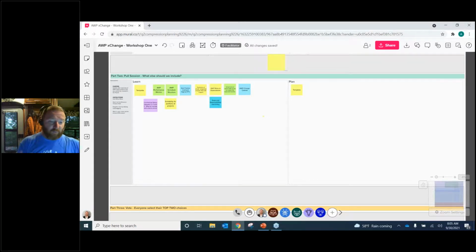So the savings came from the CII work, and we factored it based on your organizational maturity and the timing. Then, from the cost side, we looked at basically people, process, technology. For the people side, it's scaled to the size and duration of the project. Who needs to be involved that's new? Like an AWP champion that might not typically be on your organizational chart. Who needs to be involved earlier?